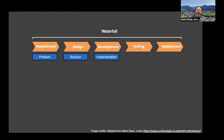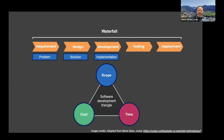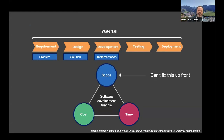The problem with this approach is there's a huge amount of uncertainty in those phases. For a project it's very tempting to try to fix scope, cost, and time up front. But as we saw, we can't get rid of uncertainty, and so we can't fix scope up front. In practice, with a big single-iteration waterfall model, you get partway through developing your scope and then realize you need to cut things, or you're going to run over time or over budget.